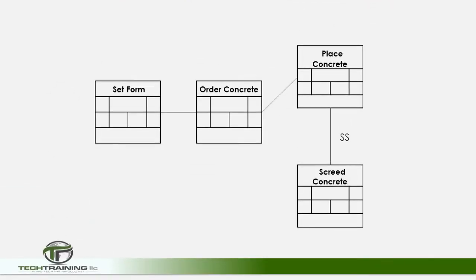In the start-to-finish relationship, not to be confused with finish-to-start, an activity cannot be finished until a previous activity has been started. As an example, our concrete sidewalk may be delayed if we went to the traditional finish-to-start relationship. As seen here, it is suggesting that the concrete cannot be ordered until the form is complete. This is obviously not true. Ordering of the concrete is not dependent upon the completion of the formwork.